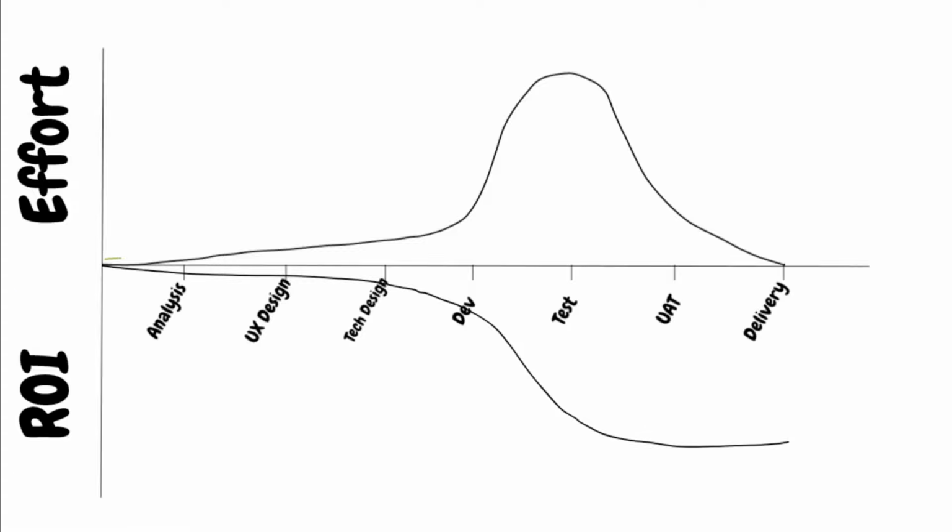So, as the project goes on, what the managers will probably hear is that everything's green and everything is going fine. Probably much to the manager's delight. But at some point we'll get to the test phase, things will suddenly go red, and we'll find, what have we got? Bugs. And a lot of them. Now this wasn't part of the Gantt chart at the beginning. So what are we going to have to do? We're going to have to replan the project, go back to the customers, and extend that delivery deadline.